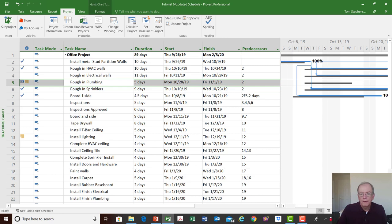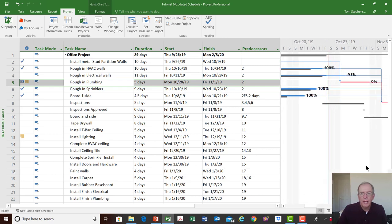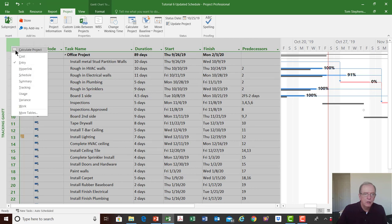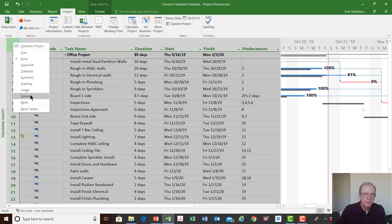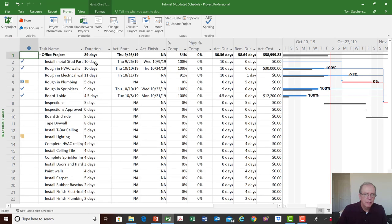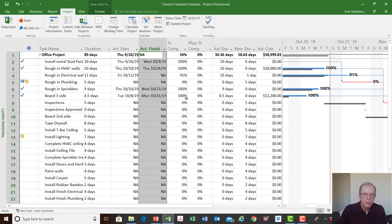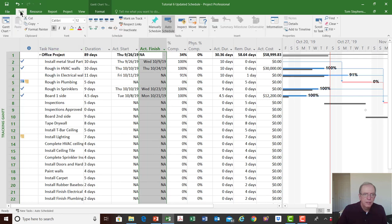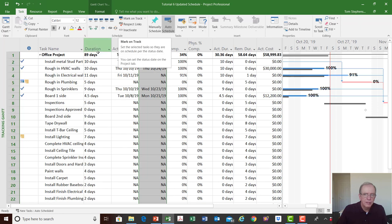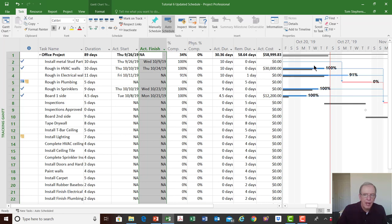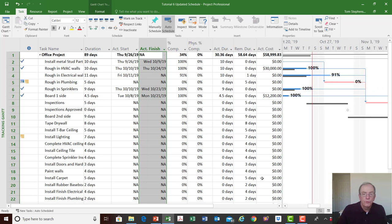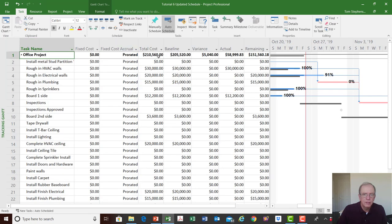So we have that information clearly entered along with our status date. To enter tracking information, I click the square icon box, right-click, and go to the tracking screen — that's where actual starts and actual finishes are entered. Under the task tab, using 'mark on track' will update an activity up to the status date. We also moved rough in plumbing since it never happened before the status date, so it had to be rescheduled.